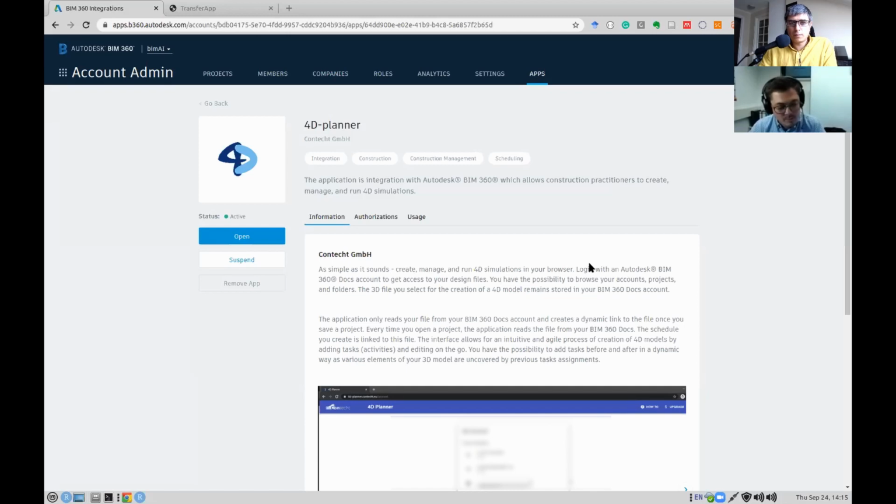One of the missing parts when you look at Navisworks and then you look at the BIM coordination is the 4D simulation, right? So you have the construction simulation. And in BIM management, when we are talking about clashes, we are talking about two types of clashes. Let's say geometrical ones, which is the most common clashes we extract or try to identify in our project, and the other one is time related clashes. Overlapping. Yeah, exactly.